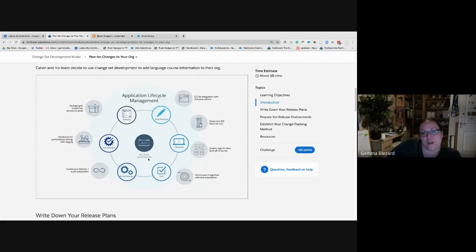So in a waterfall environment, that release planning might look like a spec. We're going to configure accounts. They will have 5 page layouts. They will have 35 custom fields. 15 of them will be integrated from another system. 20 of those fields, the data from those fields will be sent off to the finance system, for example. And this integration will look like this. It will take this estimated amount of time. It's dependent on the data model being produced, and it will go in the project plan like that with all its dependencies.